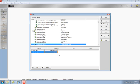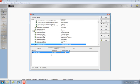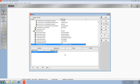There are two ways to assign the maximum units per time. The first way is that Primavera will go to the Resource tab and review all of the resources that you've assigned to that role. For those for whom it is their primary role, it will take their maximum available units and accumulate them to arrive at the maximum units per time for that role.